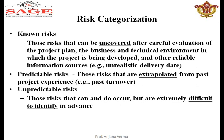Now, first we categorize risk. Known risks are those that can be uncovered after a careful evaluation of the project — evaluating the project plan, business, technical environment, and all things like unrealistic delivery dates. Predictable means those risks that have already come before — you can predict them based on past experience. Unpredictable means they come and if they occur, they are extremely difficult to identify in advance — we cannot identify them beforehand.